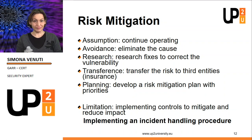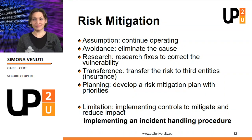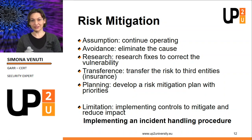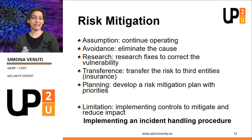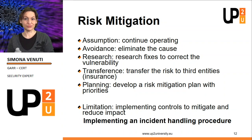Assumption of the risk: we continue operating doing nothing. Avoid the risk: eliminate the cause by patching, buying new hardware, training people, and so on. Transfer the risk to third-party entities like insurance.